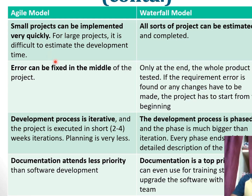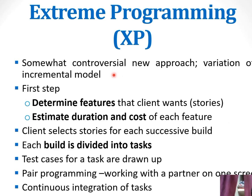Smaller-range projects can be implemented very quickly in agile, while all sorts of projects can be implemented efficiently in waterfall. During the middle of an agile project, it is possible to fix output, but in waterfall, errors can only be recovered after testing or from customer feedback at the end. The agile development process is iterative-based while waterfall is phase-by-phase. Agile gives very less priority to documentation, whereas documentation is a top priority in waterfall.